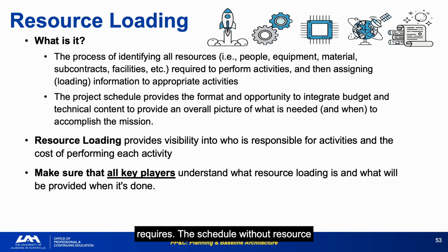The schedule without resource loading answers when, but not what will it take. An unloaded schedule is useful for milestone tracking but cannot support budget phasing, workforce adequacy analysis, or JCL calculation. The cautions against resource loading are real. Inadequate tools, undefined resource pools, and resistant team culture are all valid obstacles. But the alternative, no resource loading, means the schedule and budget are never validated against each other.